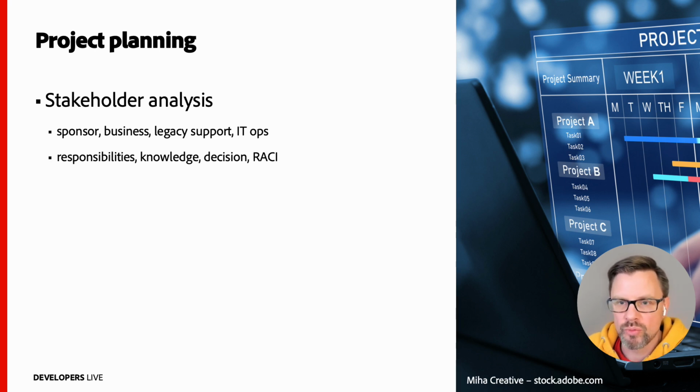Make sure to document the roles you have identified in the analysis. What are their respective responsibilities? What knowledge can be expected? And what decisions can these roles make? A RACI matrix is a good start for such documentation.